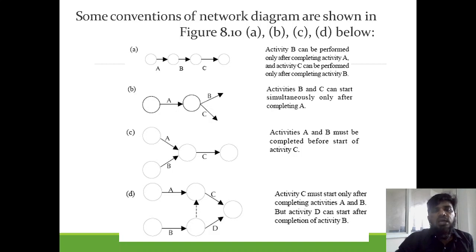Both will start immediately. Here in this, if you understand, until A and B are completed, C will not start. If A is completed but B is still not completed, then the event will not be started either. Both should be completed. Here one completed means both will be starting at a time. Even if there is a time lag or time delay, only when both are completed will this start. Okay.